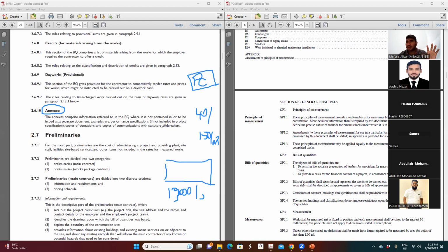They cannot take the excuse that this company didn't answer my call, I don't have a quotation. They have a quotation. What they have to do is just put their supply and installation cost. That's all. Then we will not see much variance in the price. Everybody will price it. Someone will price 140, someone will price 160. Plus minus fluctuation is there, but we don't want to see 250 dirham per square meter.